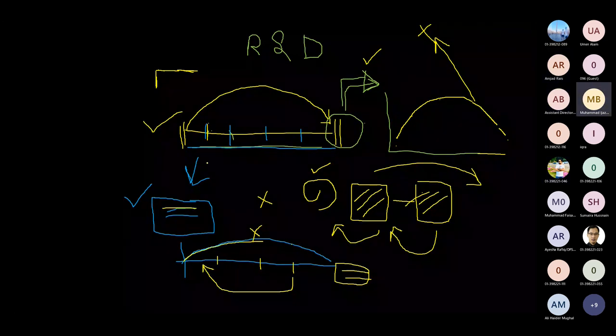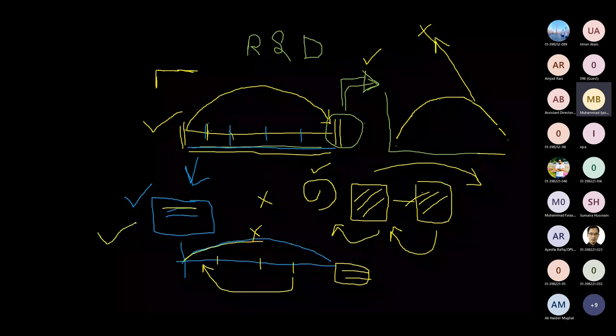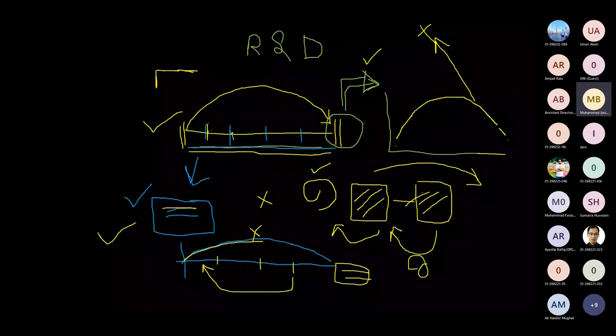So if we have to pass through the different phases of the project only once, we say we have adopted which approach? The predictive approach, right? But if we have to replan again and again, and at the same time pass through these phases multiple times, we come back, do that thing again, then move forward, then come back, redo or improve that work and then move forward. If we are again and again coming back, redoing things and then moving forward, in this case, our development approach is adaptive.